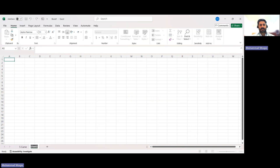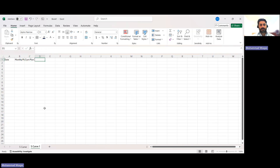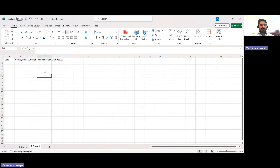I will open a new sheet and rename it S-Curve One. Let's assume we have a project extending for one year as a structure scope, and we are making an S-curve for concrete. Overall duration for concrete pouring is one year. I will set up columns: Date, Monthly Plan, Cumulative Plan, Monthly Actual, and Cumulative Actual. This is the data I need to fill in.